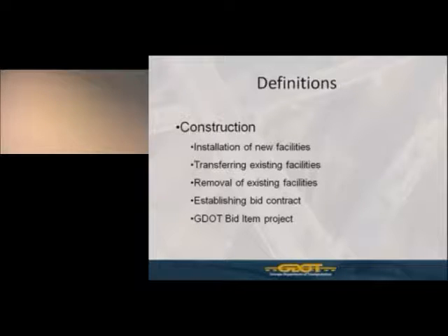So you need to ensure that you've incorporated that within the time frame of your schedule, and even particularly, say, for a pole owner. You can't remove the poles till all the attachees are off your old poles. You may have established your new pole line and left the project at that point, but there would be a period of time when you would need to account for coming back onto the project to start removing poles. So keep that in mind. That needs to be accounted for within your schedule.